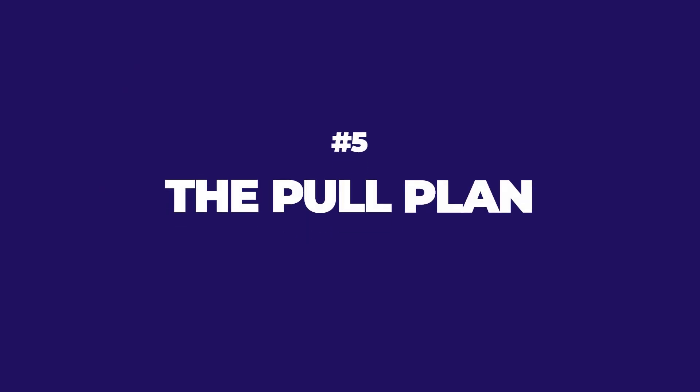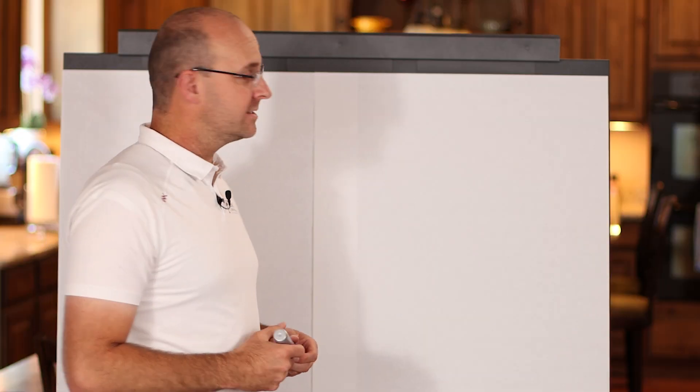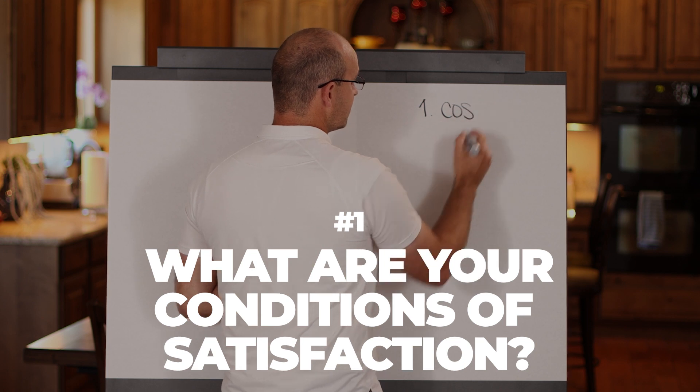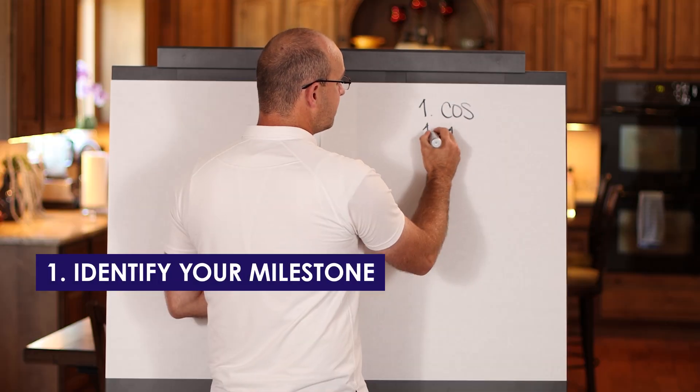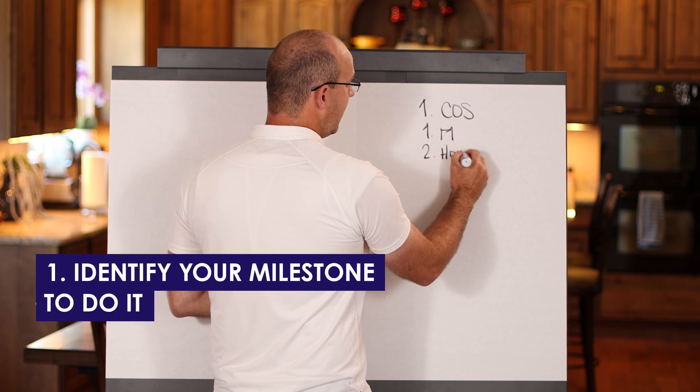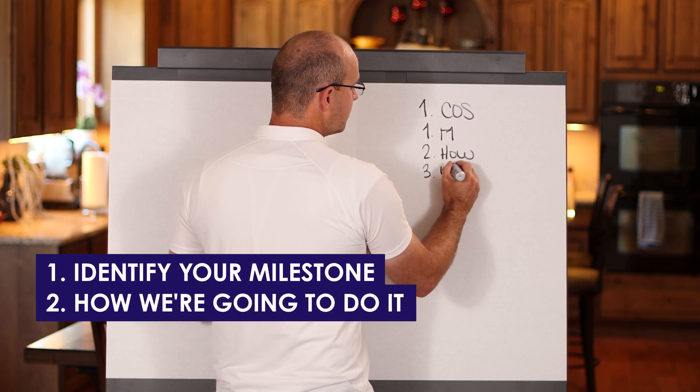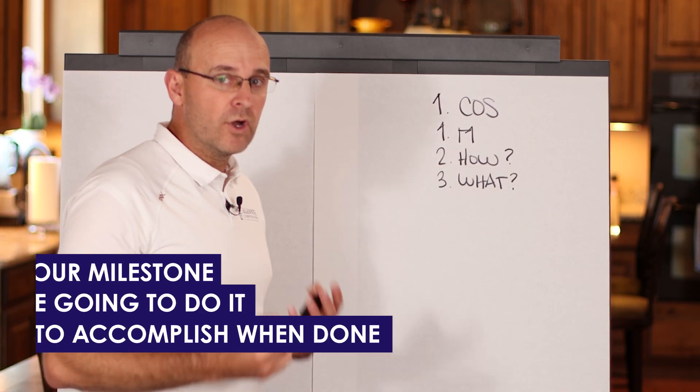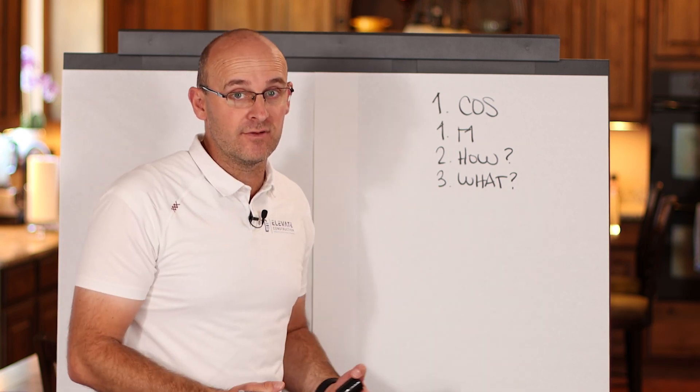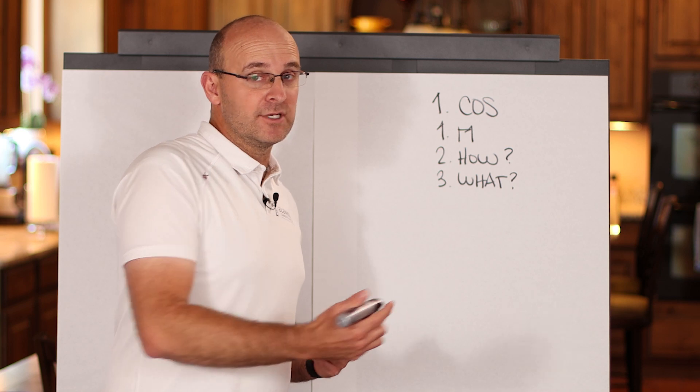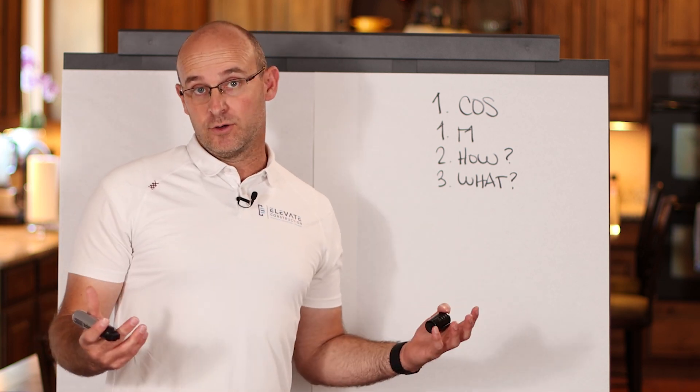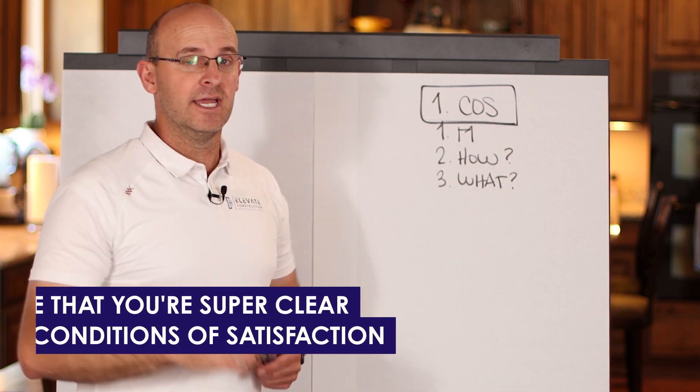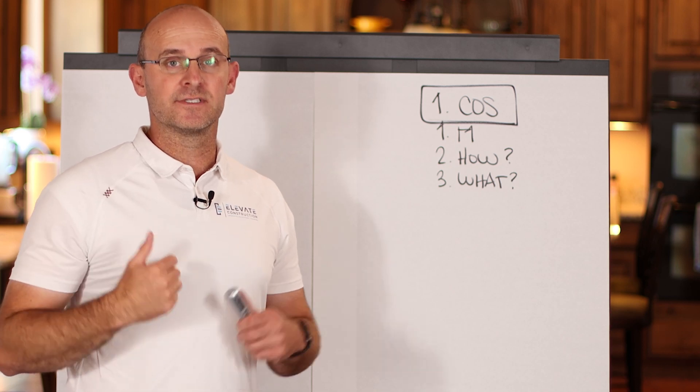Now step number five, when you go in and you do your pull plan, I highly recommend you follow these steps. Number one, you will say, what are your conditions of satisfaction? Meaning, this is the milestone that we're pulling to. Number two, this is how we're going to do it. Number three, this is what we want to accomplish when we are done. Really outline what are we doing here? Are we pulling this at a high level, low level, super detailed? Are we getting ready for commissioning, for rough-ins? Are there any owner requirements? Make sure that you're super clear about the conditions of satisfaction. Meaning, if we do these things, I, as the facilitator, will be satisfied.